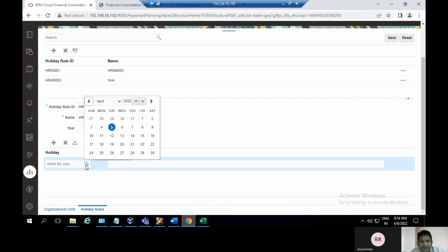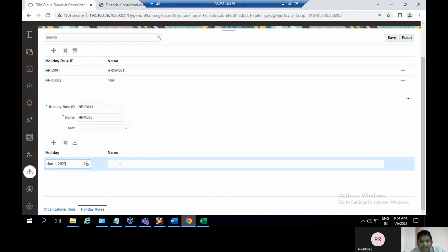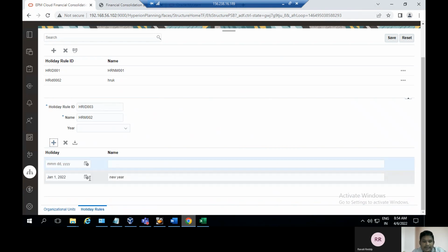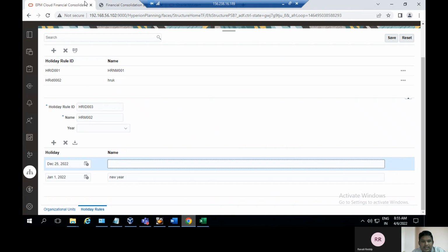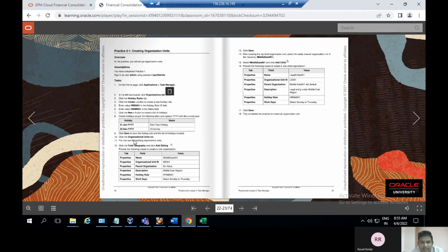You have to set the holiday rules, and here select January, and here the day one, and give the name New Year, and then add, and here select December, set the holiday rule here for December, and here give the date, and the holiday name is Christmas.